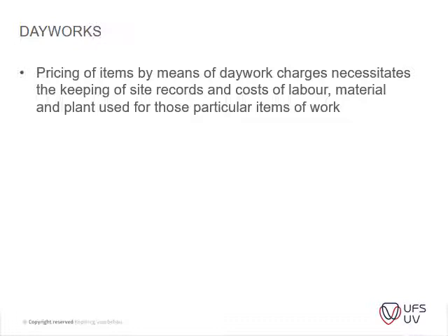What they say here is you need to keep record of it. So obviously you need to keep track of the actual hours worked on those items. So usually the clerk of works, together with the contractor's site agent, keep record of how much time was spent on that item.